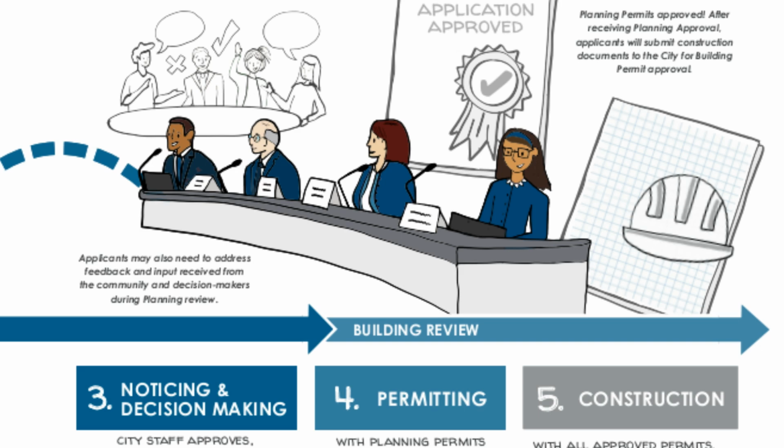Failing to address all the city's comments will result in additional rounds of review and add significant time to the review process. Project completeness. A term of art and a legal requirement, your application must be complete before it can be evaluated. If information is missing, planning staff will provide a letter with materials you need to submit. Failure to submit the requested materials will prevent your project from being reviewed and deemed complete. CEQA. If your project requires CEQA review, you will be notified at this step by a planner, if not during the pre-application meeting.